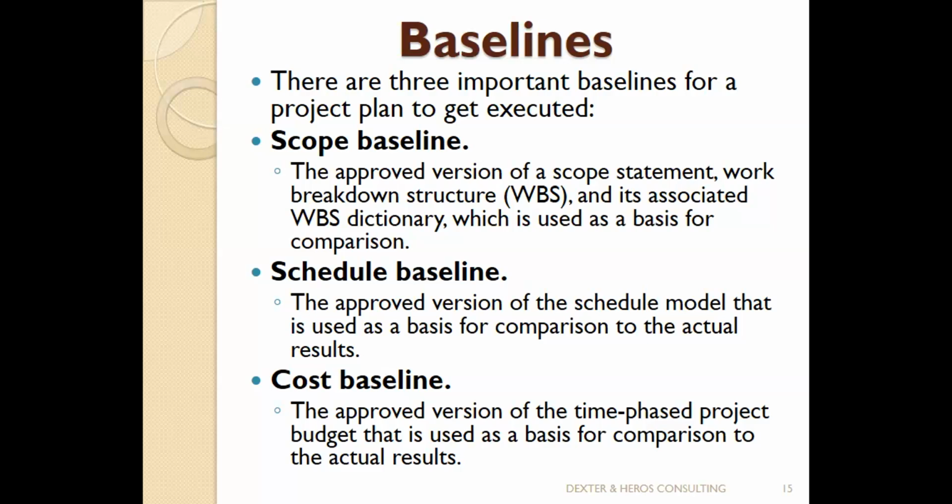In practice, in reality, most times, the areas where we consult the sponsor for approval before we make a change are if there is any change in the scope we want to make, if there's any change in the schedule we want to make, and if there's any change in the cost that we want to make. Those decisions are made by the sponsor.